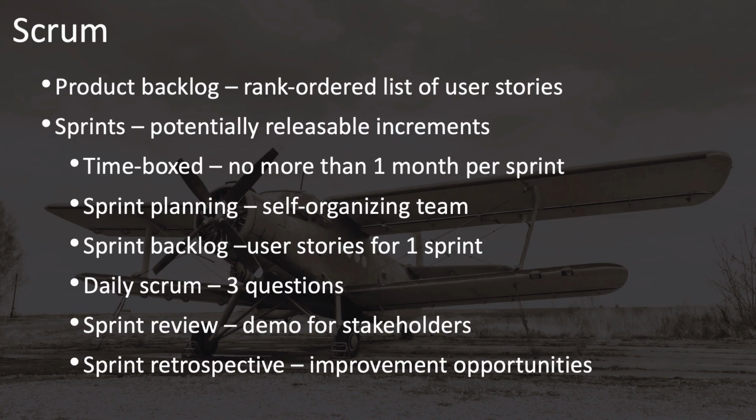Then at the end of the sprint of 2 weeks or so, you have a review, which is basically a demo for your stakeholders to show them what you've done. And what you've done should be something that is of value, that works and usable by the users.